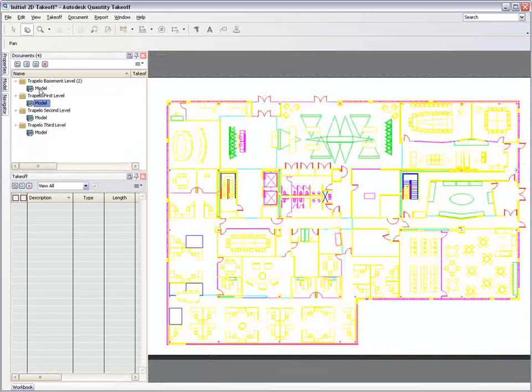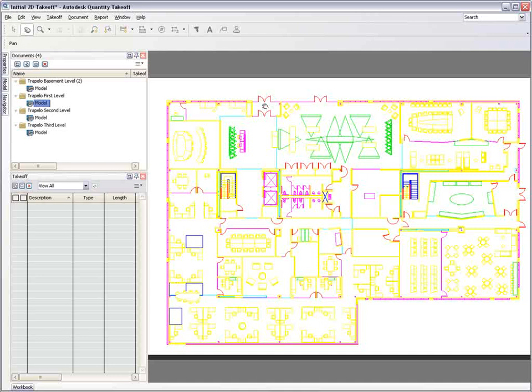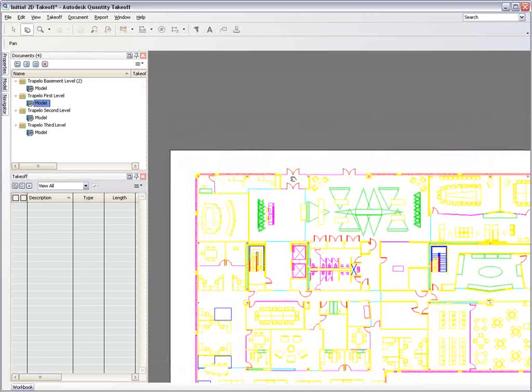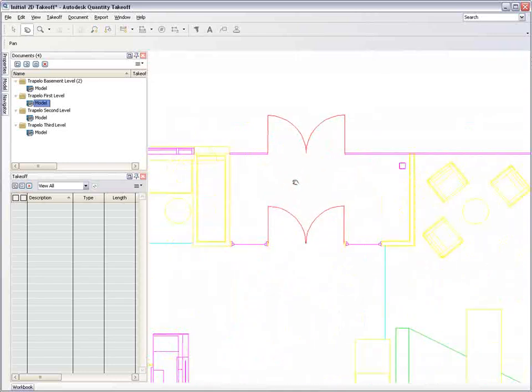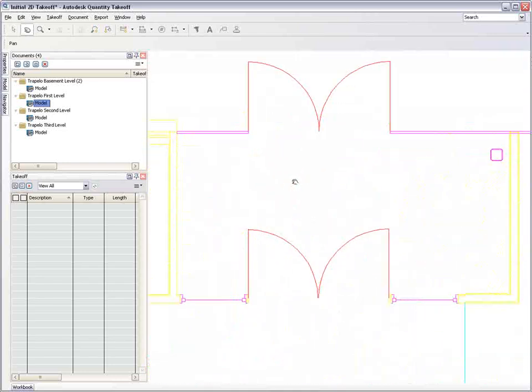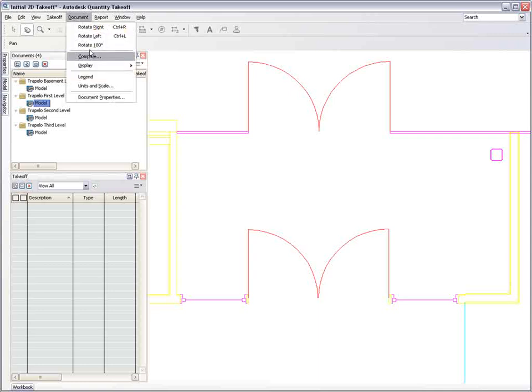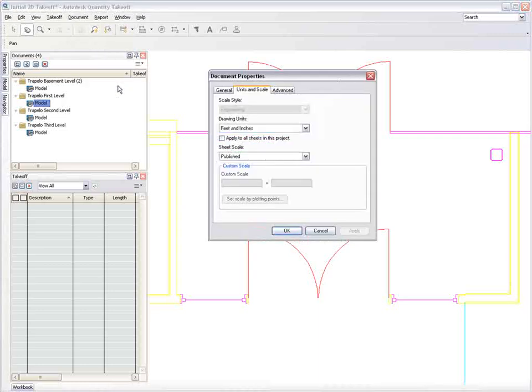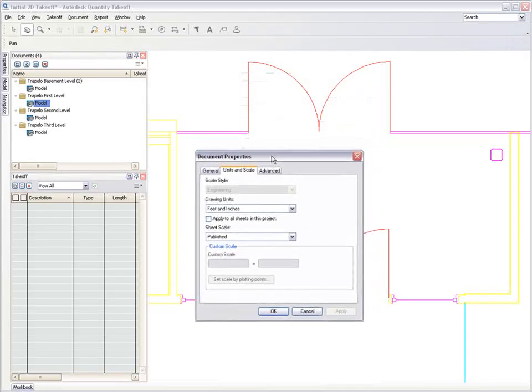Even when there is no intelligence behind the files being used, you can manually measure an object of known dimensions and use this to set the scale for the project files. All linear and area takeoffs are then automatically calculated and recorded in the correct scale.